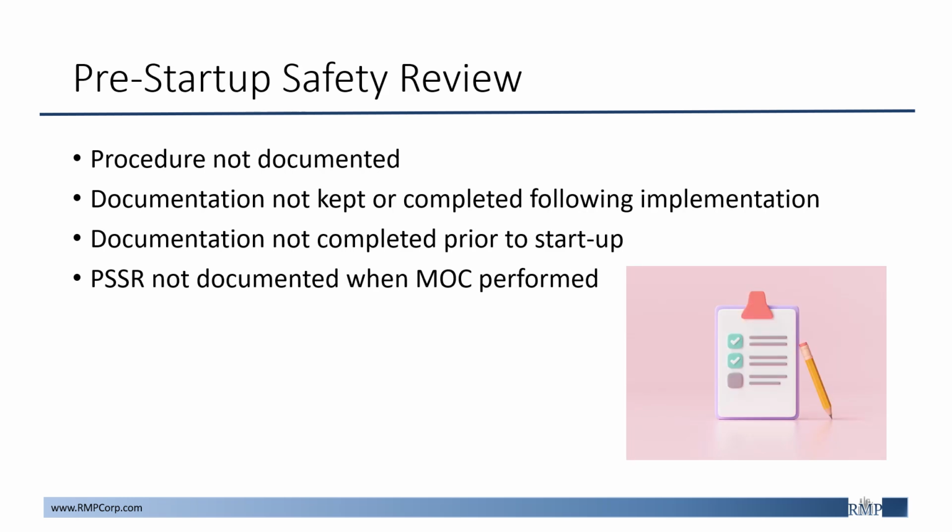So pre-startup safety review, also known as PSSR, deficiencies are almost identical to those associated with the management of change process, the MOC process, as this review's purpose is to ultimately ensure that all potential new hazards for changes are analyzed and that all documentation is updated prior to your startup. However, it is important to ensure that these procedures are both individually performed to adhere to regulatory requirements.